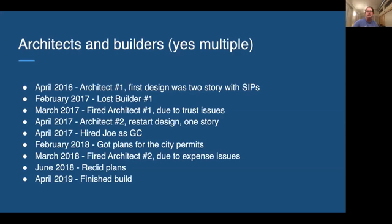And during the summer, we spent time doing cost analysis on how, like, one of the main things you have to decide when you do a passive house is what your wall system is going to be. And so we actually evaluated 4 different wall systems, did some cost analysis on that, and because of that, we ended up deciding to go with insulated concrete forms.